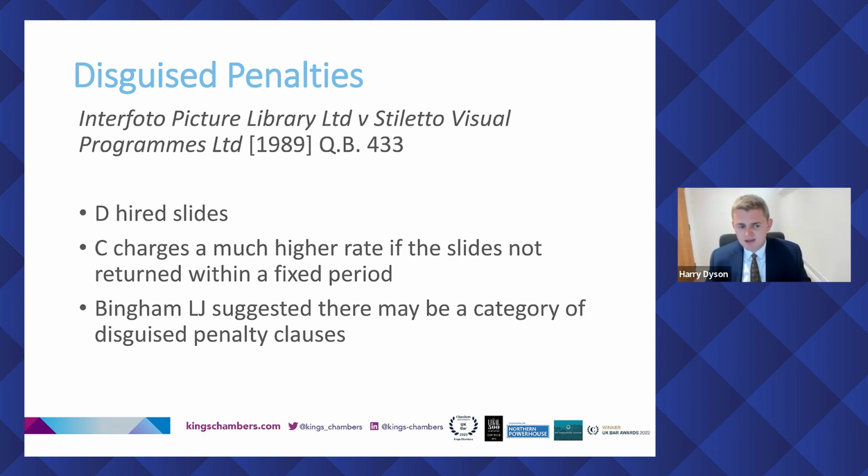Now, in this case, it wasn't actually argued that a penalty clause should be considered, but that didn't stop Lord Justice Bingham going slightly off-piste and starting to discuss this, where there may be a category of disguised penalty clauses. And I think this is important just to touch upon, because I think it's fair to say that since the Cavendish and Parking Eye judgments, the people drafting contracts are becoming more and more alive to this concept, and in short, are finding very clever ways of packaging up clauses to make them appear as primary obligations, to make them immune from this penalty clause doctrine. I'm sure you can imagine how they may do that, but believe me, when you see one that's capable of being a disguised penalty clause, it is sometimes quite impressive how they've managed to package it up.